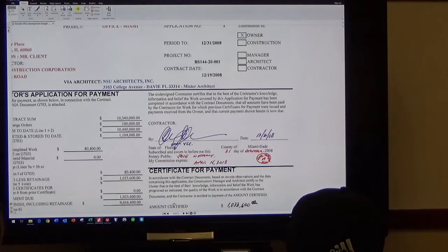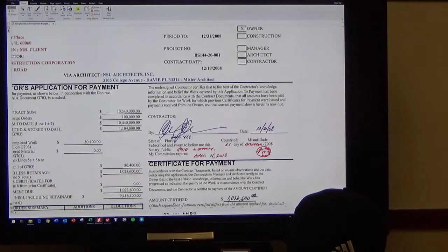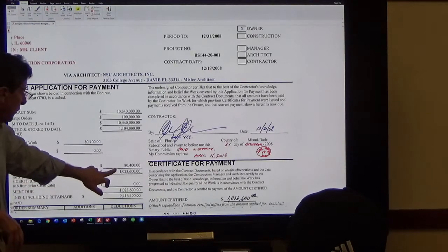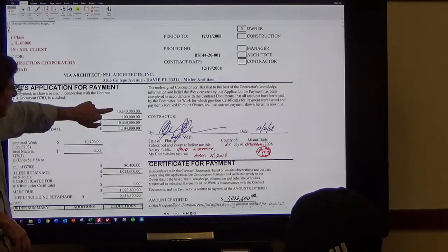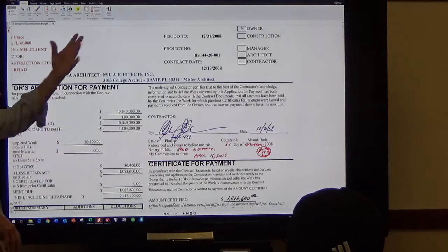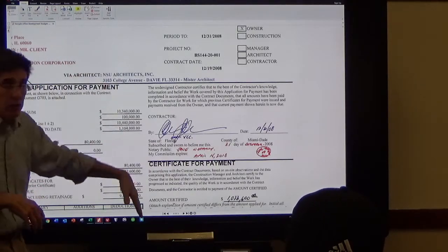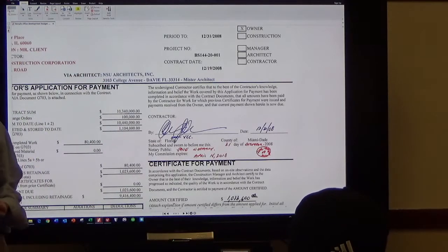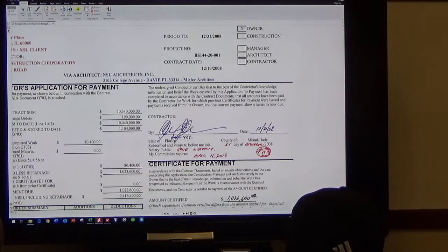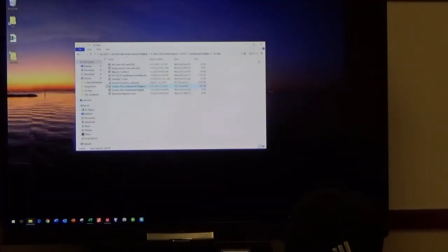Okay, and they're progressive invoices. So you bill 1, 2, 3 the next month. You still have the total amount, but you say billings to date less previous billings, and you work back to what the billing is for the month. Okay. So we're not going to do this, but I wanted you to see how that process flowed so that you know that a little bit better.